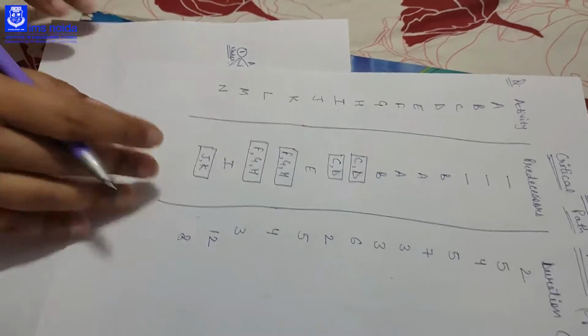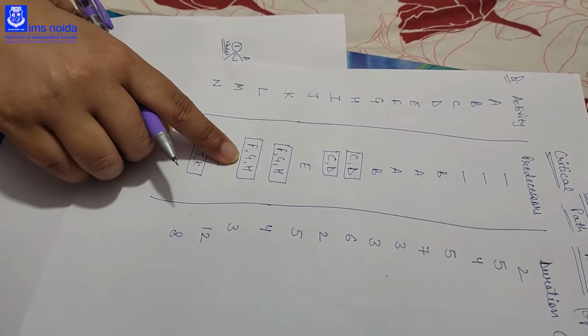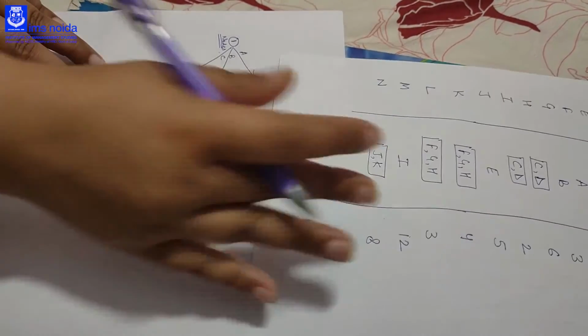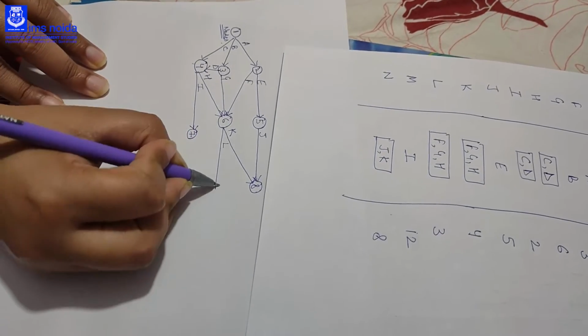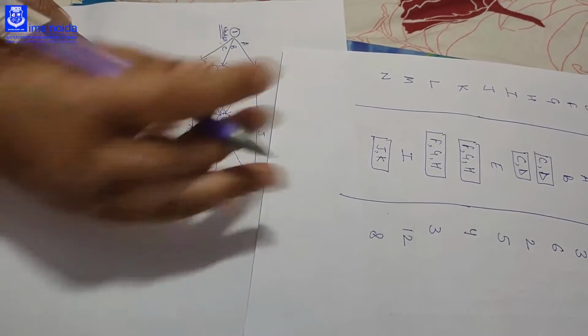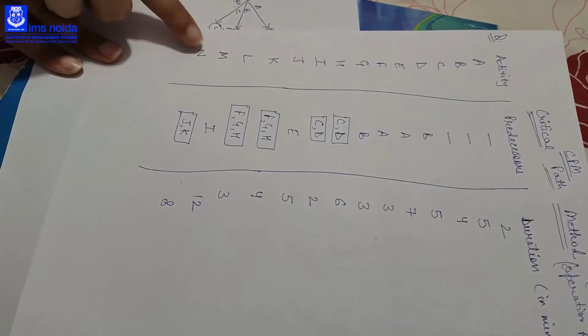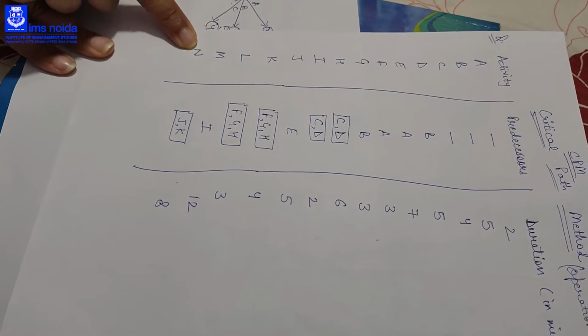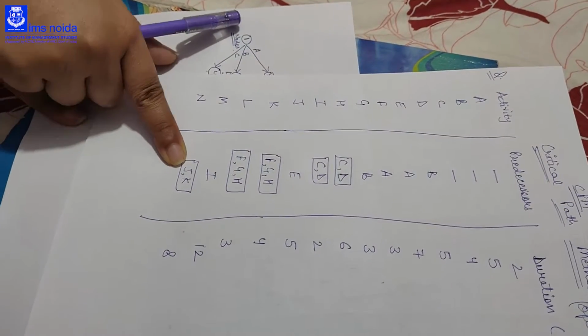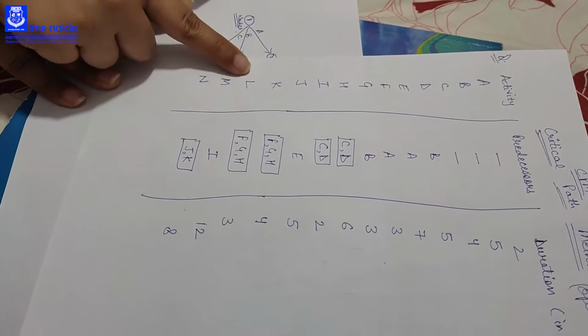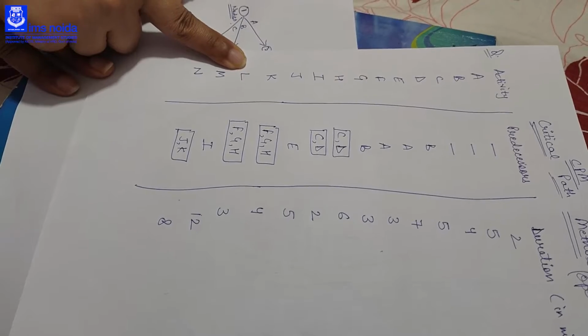Okay. Now L is starting with the FGH. So we will start L with the FGH. L, that is 9. Then M. Now you can see that only two activities are left. M is starting with the I and N is starting with the combined node of J and K. So we will combine M and N with the L to end your path.